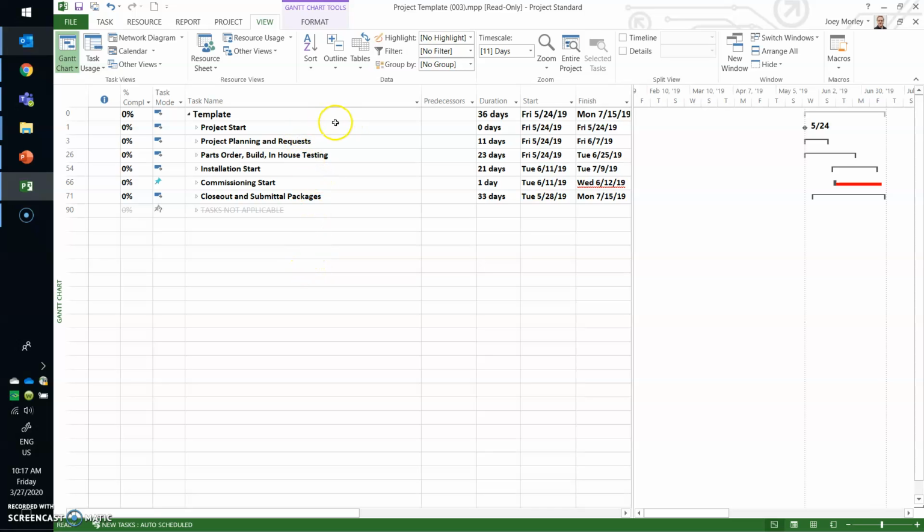So now that I've seen level 1 here, where I would start with putting in real information, or I should say current information, we just come in here and click on the start and finish dates of the tasks. Now you'll notice on this parent task, I'm trying to click in this start date here. I can't change it. What is happening? The reason why is because you have to change the individual tasks, not the main master task. This duration of the project and the start and finish date will be automatically updated in Microsoft Project as you go through and fill in information.